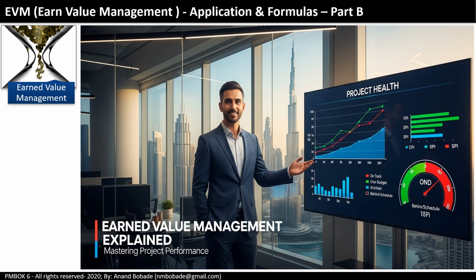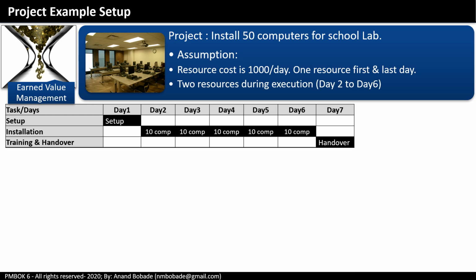Alright, let's apply these EVM concepts to a real example. Imagine you're the project manager for a school computer lab installation. Your task? Install 50 computers. On day 1, you have one resource for setup. From day 2 to day 6, you assign 2 resources daily to install 10 computers per day. On the last day, one resource will handle training and handover. Sounds like a simple plan, right?